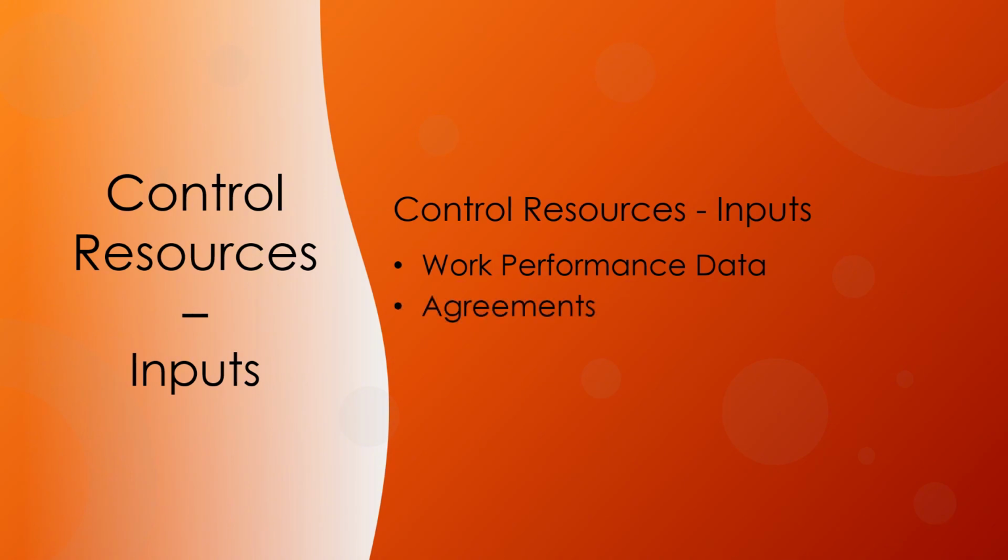Agreements made within the context of the project are the basis for all resources external to the organization and should define procedures when new, unplanned resources are needed or when issues arise with the current resources. The organizational process assets that can influence the control resources process include policies regarding resource control and assignment, escalation procedures for handling issues within the performing organization, and lessons learned repository from previous similar projects.